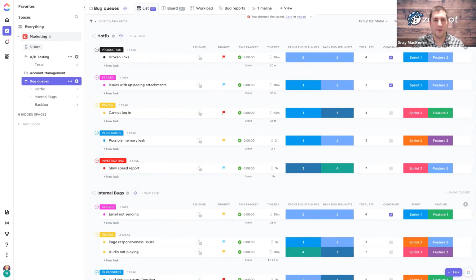But the big win here, the big unlock and power up, is when you have templates for the work that you're doing. Now, obviously, if every single job that you do is 100% custom, including the process, whether that's because you're super early stage or for some other reason, that's a vast minority of firms that we're working with. But once you have those templates built out, a lot of that work is already in there. So we're not trying to create tasks as we're actively time tracking. The work's already planned ahead of time. And if you want to be able to scale, that's going to be a prerequisite for the agency anyways.